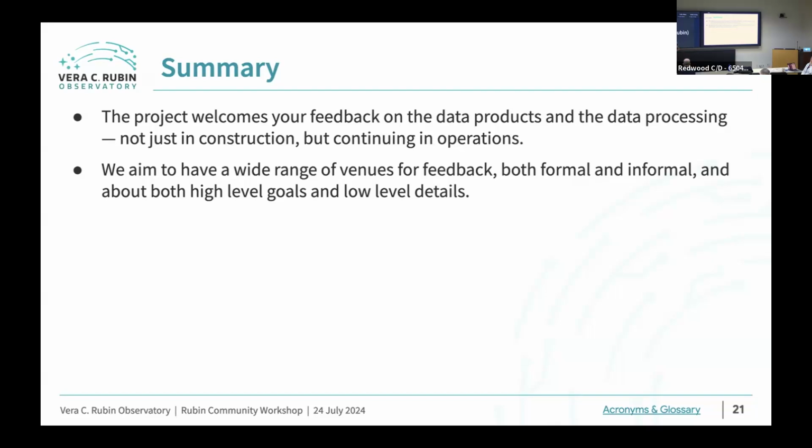We've been told DM shall do a data release every 12 months. Yeah. And you only get enough money to have cores such that if they're chugging for the full 9 months, you can complete that. And there's no way to do 2 sets of coadds, which would be to reprocess the Y1 coadds at the same time as doing the Y2, because that's the problem.